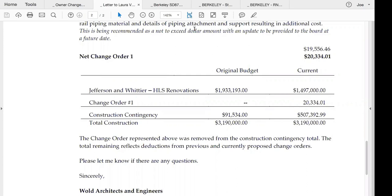But I think the best course of action, and we'll talk about this one more time with our team, is to level the floors, finish those spaces out, and then maybe do some shoring of the slab underneath, because I think we're talking about millimeters of movement, so it's been very gradual. And the testing company will continue to track that, but I think we're at a point where let's let that renovation finish up the spaces. At the start of school, everybody will be in the spaces as finished as they're supposed to be.